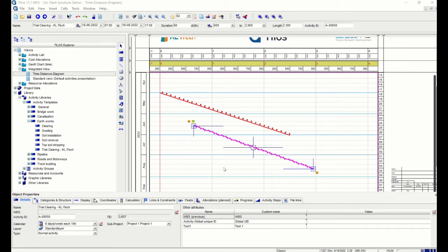What is the use of making an activity into a template? It is by making a common set of activities for your project or for your organization. You don't have to create it every time. So what happens is, once you fix this pink color line in this shape to mean clearing, you're going to incorporate the same in your project, and over a period of time, after a couple of reviews, all the stakeholders, engineers, foremen, managers, and any other reviewing personnel will be used to the fact that this activity is called a clearing activity in this color, and they don't need any other annotation. Automatically they will see, and it will be unique for that project or for that organization. This is the advantage of it.